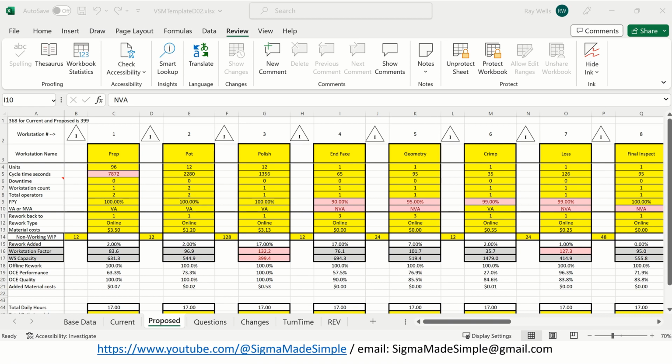So once you decide on Six Sigma projects by playing with the numbers here, populating the EIC tool and doing the initial project charter, you may decide to combine them. Like in this case, you may find that the KPIV for in-face and geometry is the same process at polish. So you may combine them in one project, but never combine projects unless they share the same KPIV.